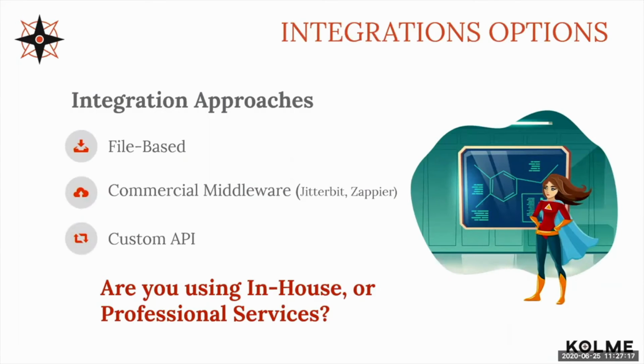The idea here is this can be a very manual process, so it can be basically free from an integration perspective, where you're taking an extract of some kind and you can even manually import that into the PPM tool. We see this sometimes for project initiation, or maybe a weekly job to import timesheets into your PPM tool or take data out of your PPM and import it into your ERP. So that can be manual, or you can take that to the next step and write a script, a Python script or something like this, that can automatically pull and push that integration data.